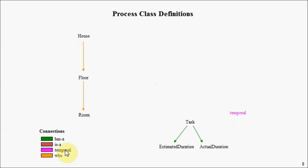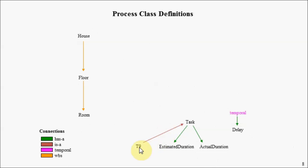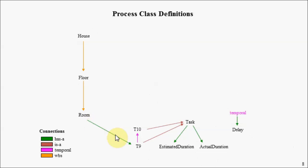A second property called actual duration. We'll introduce a new kind of connection called a temporal connection, and we're going to introduce an attribute associated with that connection called delay. We'll introduce an entity called T9, which has an 'is a' relationship — so T9 is a task. Similarly, T10 is a task. We're going to create a temporal relationship between T9 and T10, meaning that in order to start T10, T9 must first complete. Then we connect T9 as a 'has a' property of this higher-level entity called a room.